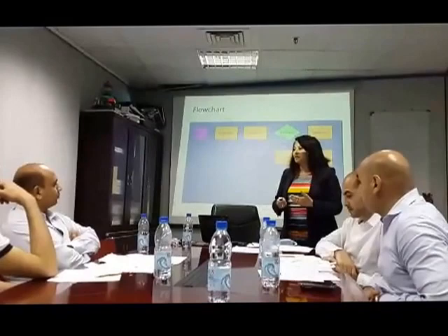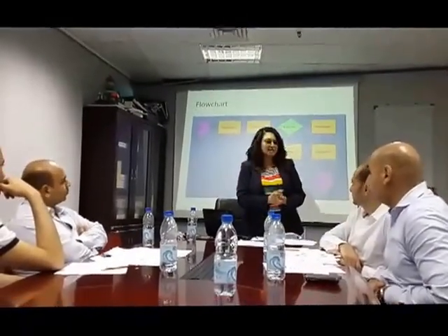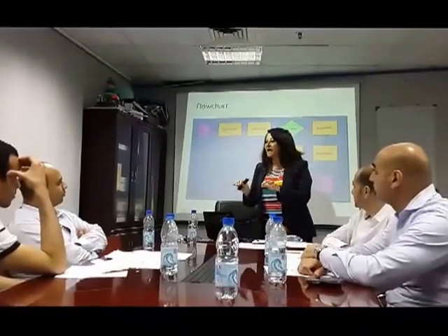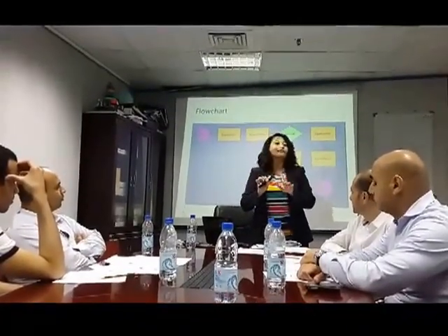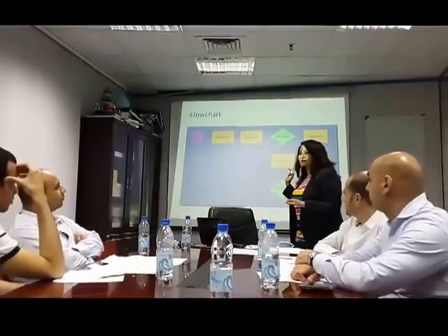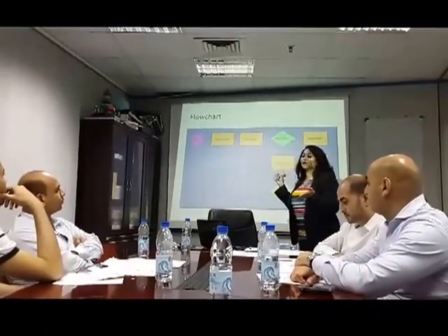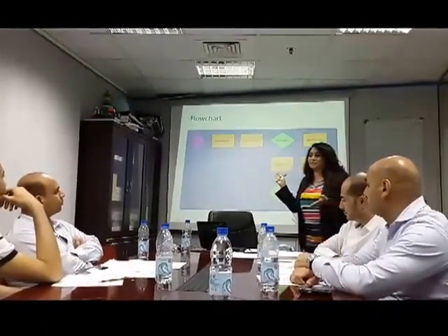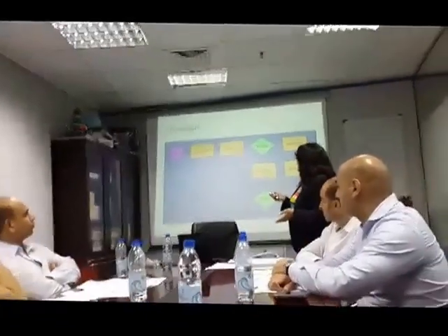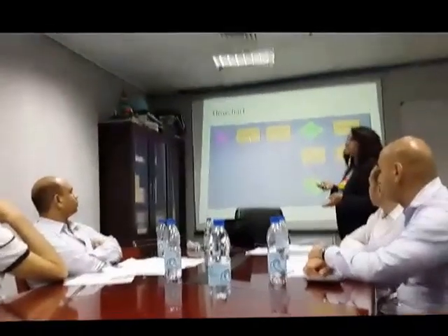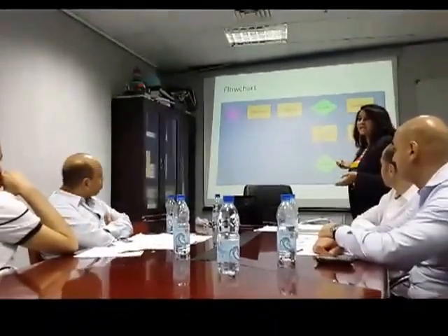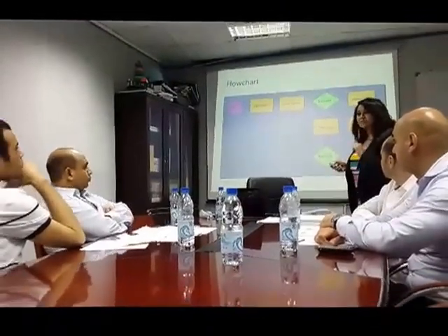Before you get the bill, you get it stamped with a receipt date, you review it, you enter it into the system, and when you get the okay for payment, you pay it, right? That's exactly what the flow chart is. Why is it useful in risk identification? It is useful because it shows me that in every box, each operation could go wrong. There are risks in every operation you do, in every step you do, okay?